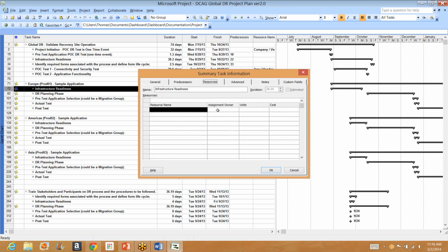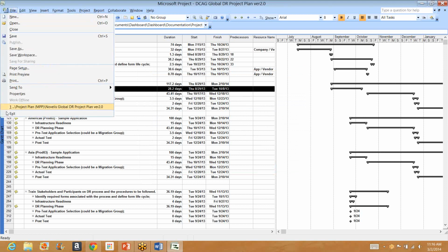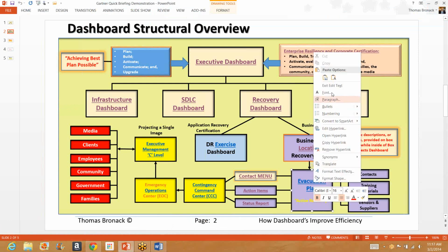And who they report to. And this would be a purchase order against a work order charged by the hour at $65 an hour. And then when you see that he has 28.2 days, that's 28 times 8, and then 2 hours after that perhaps. So he has a lot of hours, and that's what the cost would be. All from the project plan. So it's wise for you to utilize the project plan so that you can get your costing accurate and maintain it going forward.